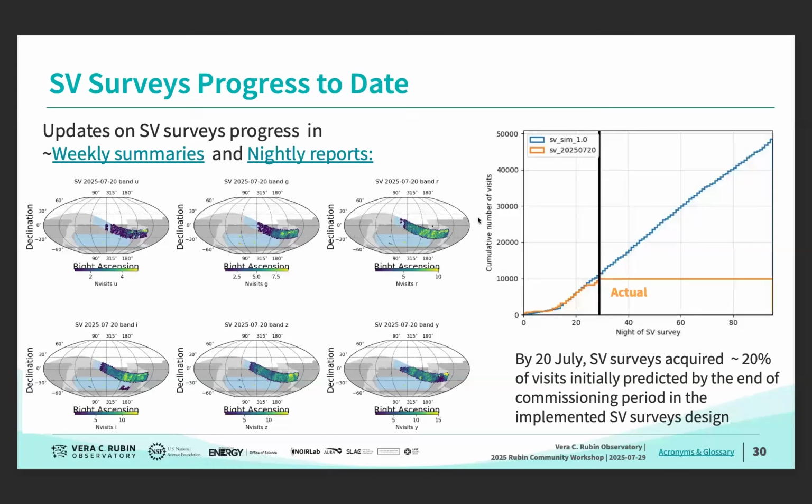So we are considering options to dedicate a little bit more time for continued optimization of the AOS and other aspects of the delivered image quality. We also have periods when the weather is not conducive, and if we lose several nights of dark time during the finite period of the SV surveys, that could set us back.